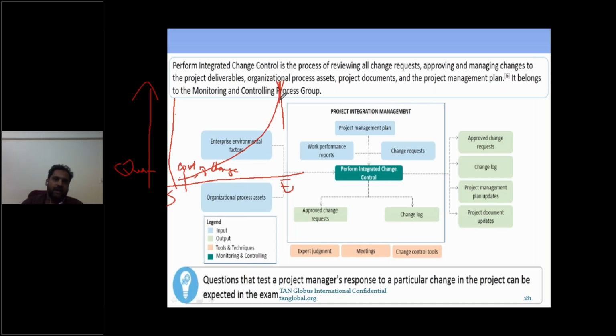Yeah. For example, in software also, once it is in production, even a small attribute change, we do a lot of tests before. So cost of change will be very small at the start. Same change, done here at the start of the project, is very easy and very simple, from the test angle and from the planning point of view. But when it is almost ready and then you change it, it's very difficult.